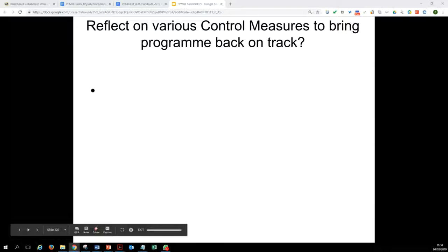Sometimes project managers also look into the, so David mentioned more resources, longer working times, changing the task importance. Another strategy which is often used is look at the network diagram and look at the relationship between different tasks and changing the finish to start relationships to maybe start to start relationships, so concurrent rather than sequential work on various activities.